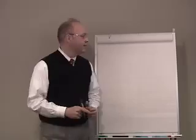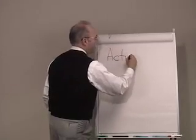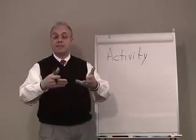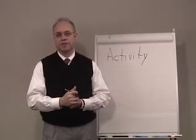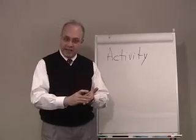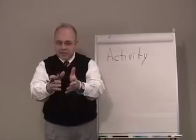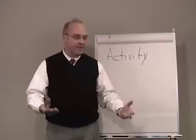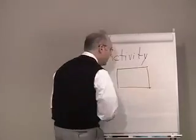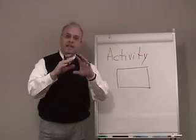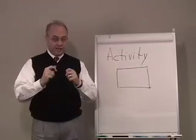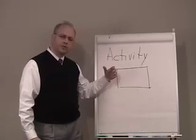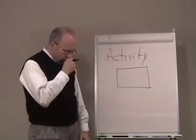Let's start with the word activity. When you use the word activity as it relates to scheduling, what we're talking about is the basic work activity upon which any schedule or plan for a construction project is based. For example, excavate area A or excavate for the footings in wing B — that's a basic scheduling activity. Typically in schedules, we're going to depict an activity as a box, in the situation where we're using a CPM schedule describing activities on the node.